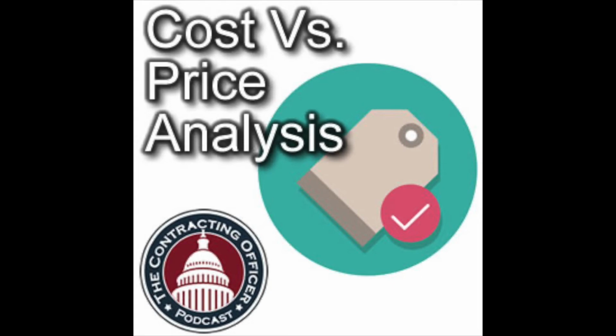It includes digging into parametric models or cost estimating relationships. Like they may not propose an exact number of systems engineers. They may say for every 100 hours of software development time, we need 2 hours of test and 1 hour of systems engineering time. That's a cost estimating relationship. It's not an exact science, it's an estimate. It also says that you need to evaluate the effect of the offeror's current practices on future costs. I'm going to read here.